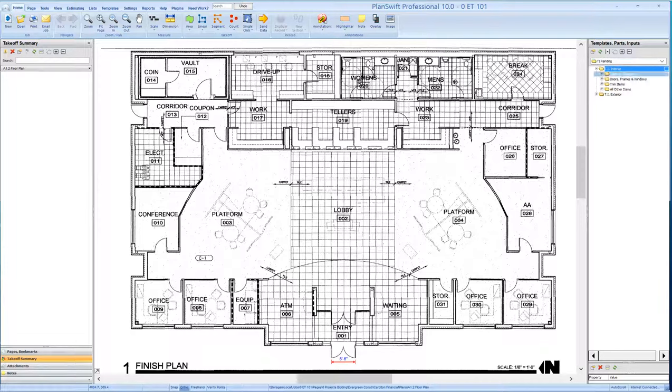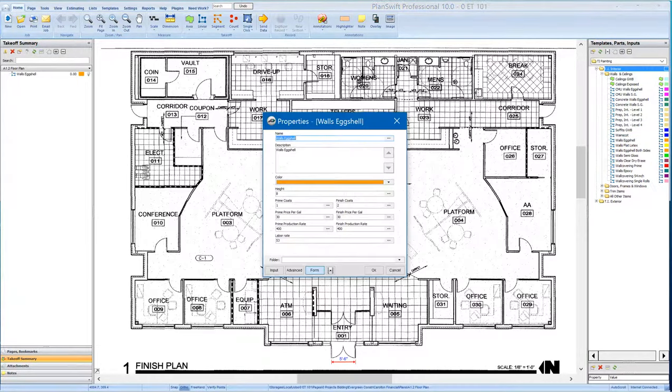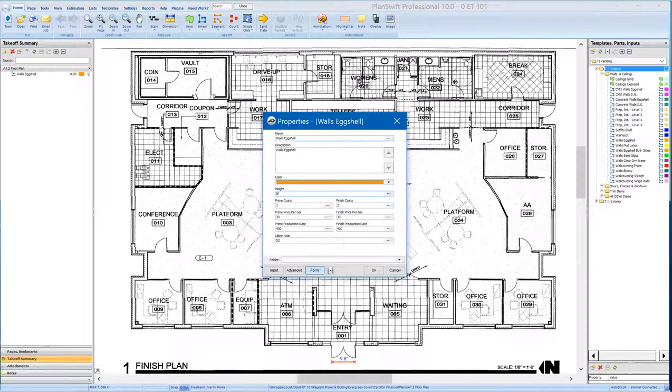I would select my interior surfaces, select my walls, and then I'd find the walls with an eggshell finish. It will automatically default with a basic description. Whatever color you want to use, you can select. You can set your wall height to whatever it is. If it's a 10-foot wall, you can select that. And it will automatically default to one coat primer and two coats of finish,